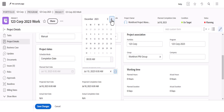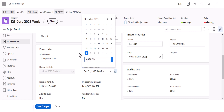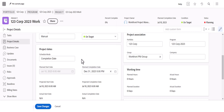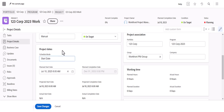So I'll put that as December. That way, if someone tries to add a task where the planned completion date is later than 12-31, it actually won't allow them to schedule it. If you have a finite date you can't go past, schedule from the completion date. If you have more leeway on your timelines, I would suggest scheduling from the start date.